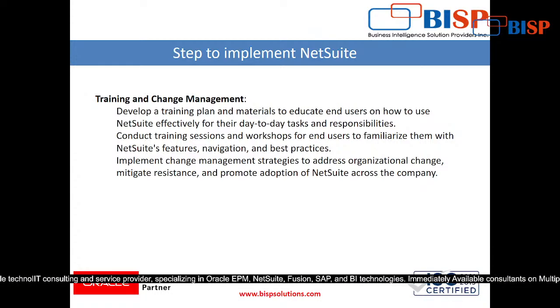So that's why all these changes are written in a change management document, because it should be on record that apart from your BRD, these are the changes that your management has asked us to do. Because if the client reaches the deadline, you should have something to show that, yeah, this is why we were delayed, right? So that's why a change management document is also prepared.